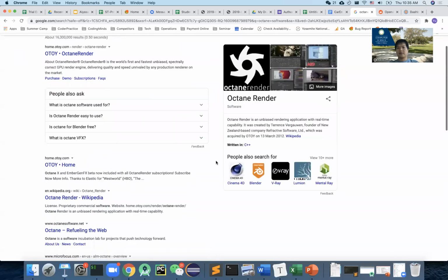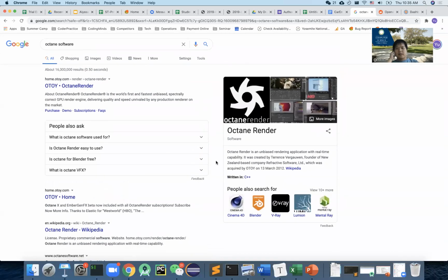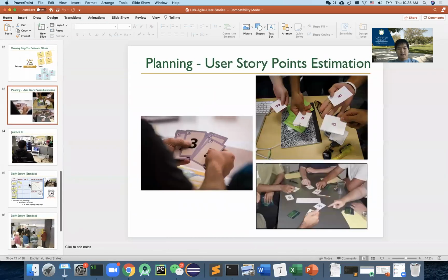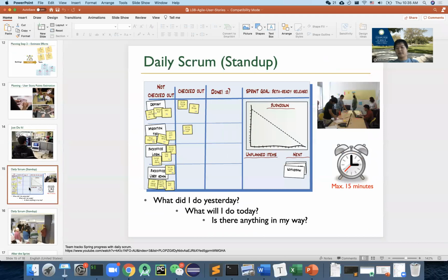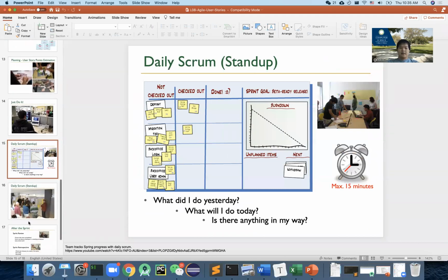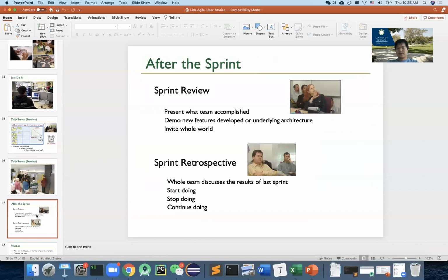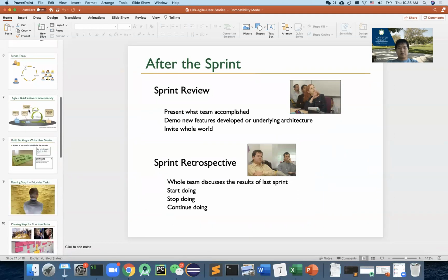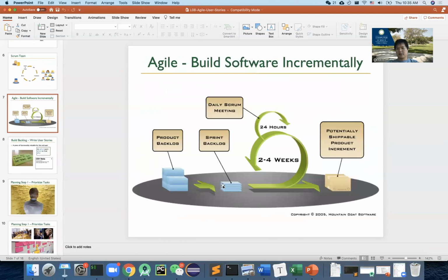All right, very cool. Okay, so I also want to talk a little bit more about Scrum. I did mention some of these meetings. The sprint meeting is very easy to understand. Right before the sprint, we need to discuss which issues to bring from the backlog to the current iteration, or icebox to current, right?